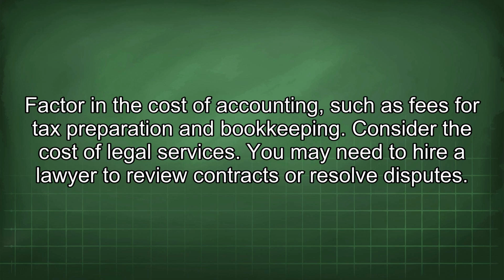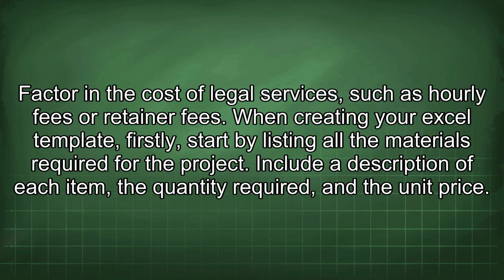Consider the cost of legal services. You may need to hire a lawyer to review contracts or resolve disputes. Factor in the cost of legal services, such as hourly fees or retainer fees. When creating your Excel template, firstly start by listing all the materials required for the project. Include a description of each item, the quantity required, and the unit price.